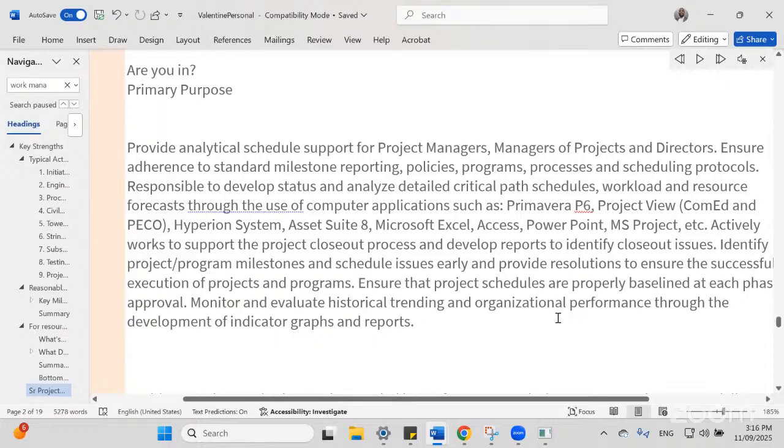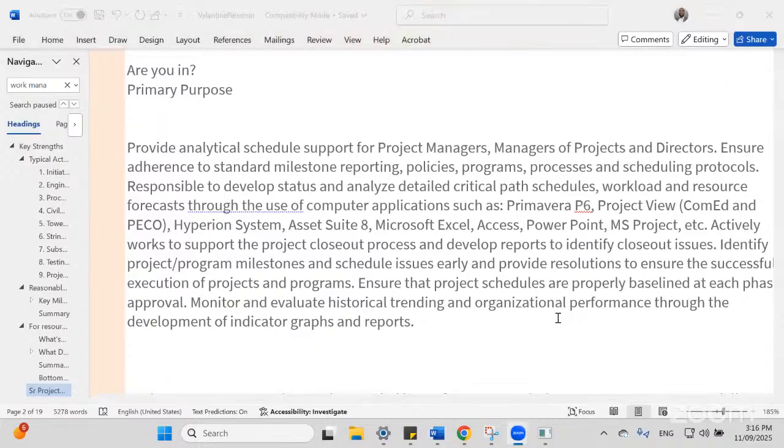For example, when you are going to complete RCC work, when you are going to complete the first floor, all finishing, when you are going to hand over lifts or elevators, such kind of milestones they purposely ask for in the contract document because of these milestones they are going to reflect to their end users. So such kind of milestones we have to update.